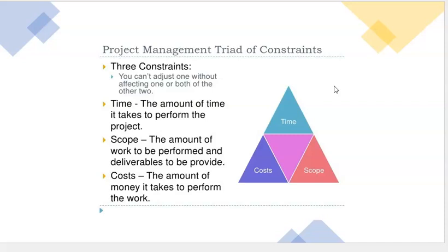So these were extras to the original contract, the original scope, the original cost, and the original time of the project. So yes, they added painting. We only had a $10,000 budget for painting. They actually added $35,000 more worth of painting and expected us to keep the same timeline.